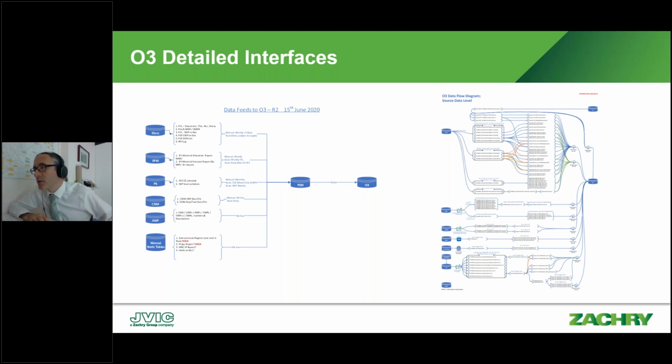Okay, right. So the containerization, so building integrations from the document management system to package CWPs, putting the document to CWP relationship, what O3 terms associations. That data is coming as integrations, installation work packages to documents coming from the document management system, and the latest revisions will come through. Design change notes, we are managing those within O3.